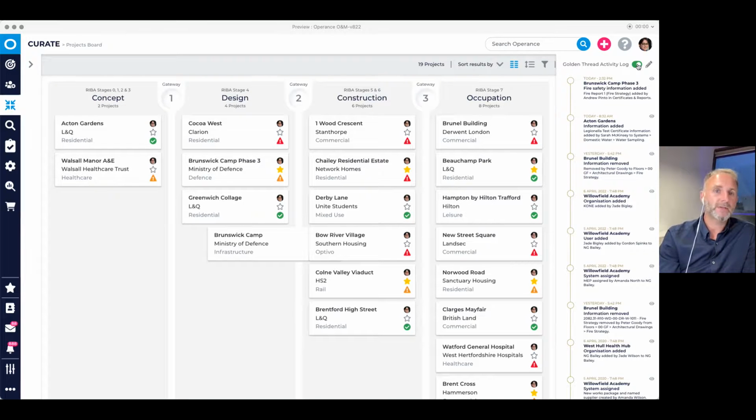But it's becoming much more powerful thanks to both machine learning and some very effective handiwork behind the scenes. Soon we'll be able to create automated alerts based on elements directly linked to fire safety. For instance, should someone look to change the specification of a pre-agreed material or element, this will create an alert to both the duty holders and the accountable persons, those responsible for the project information, in order for them to either accept or reject the changes. Pretty nifty.